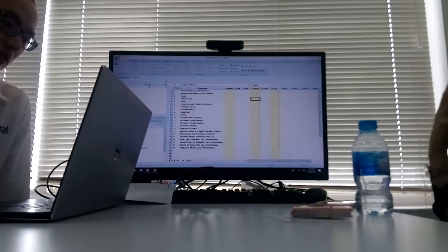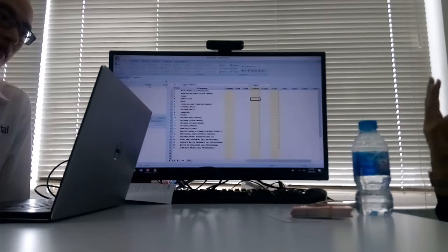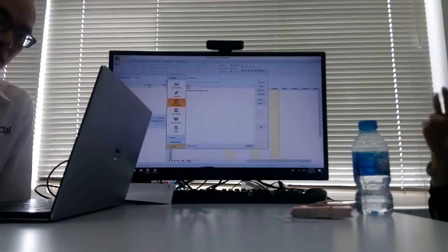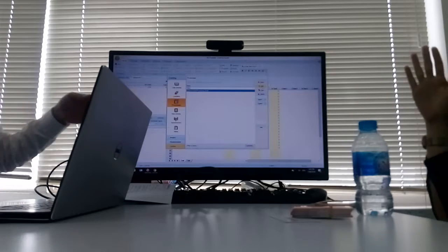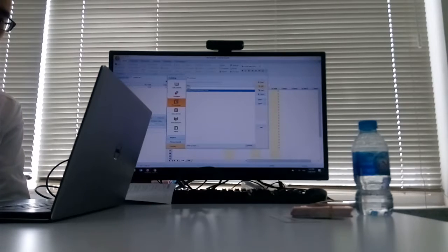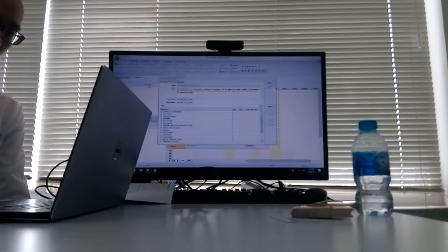Yeah, and that's why we work on templates, because every time we start a new project, we base it on the previous one, and a lot of the information is already established and the links are already there. And you also want to set up a standard dimension group list as well. You can still add ones in, but you've got a standard for particular types of projects.